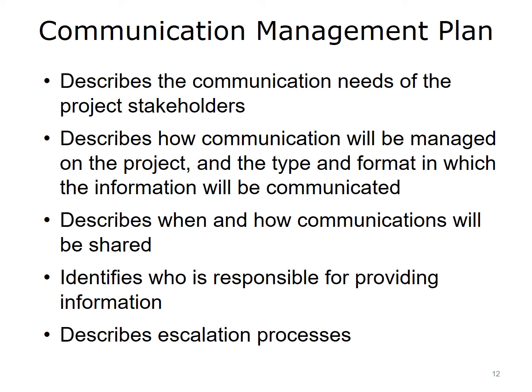Communication management plans can vary in the presentation, format, level of detail and instruction, and breadth of scope. An effective project management plan should, at a minimum, describe communication needs of project stakeholders via a stakeholder registry. Describe how communications will be managed on the project, including the type and format for communicating information. It will also describe when and how communications will be shared via a communication schedule. It also identifies who is responsible for providing information via a responsibility assignment matrix and project reporting schedule. It describes the escalation process for urgent communications on the project as well.